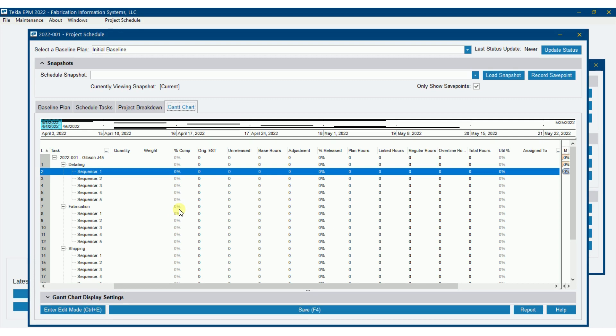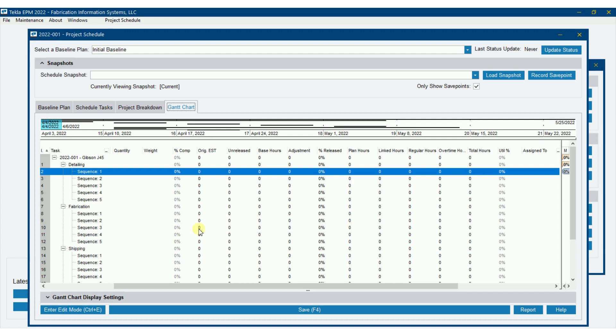Now this is where this varies from what I see percent complete being considered on a lot of schedules. Percent complete on a lot of schedules is the amount of hours that we worked. When in reality, that's not the percent completed. Percent completed is really the number of pieces that have gotten done in the shop. So this is a variation of that that is based off the actual work getting done in your shop.